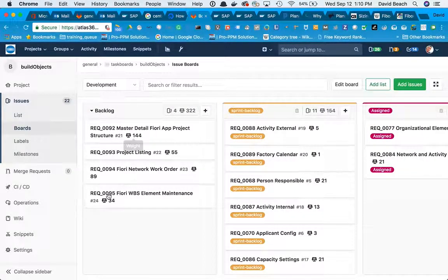So the first thing is the backlog. When we look at the backlog for the requirements spec, we have to assess the ones that are relevant for us to do as part of the sprint we're about to embark on. Some items might stay on the backlog because they're being deferred, because the system's not ready, or we're waiting for somebody else, etc.